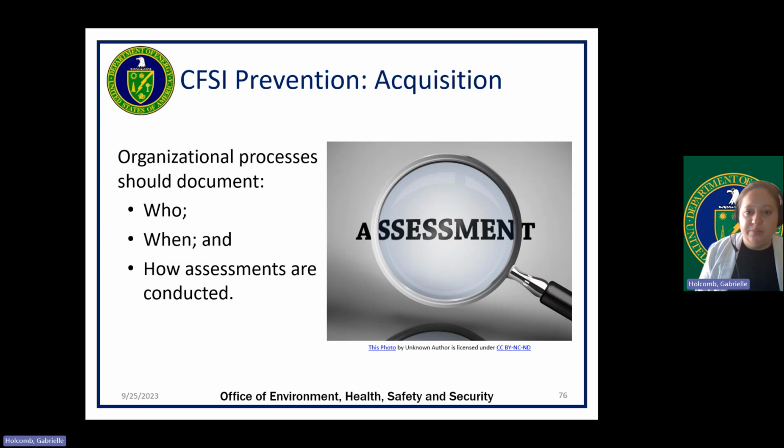Assessment planning. It is important when planning for acquisitions that we determine who will perform assessments. Often, some sort of assessment of the supplier should occur, even if it is informal. An informal assessment may be conducted by the acquisition office to verify that the supplier address is valid or that the business itself is valid.